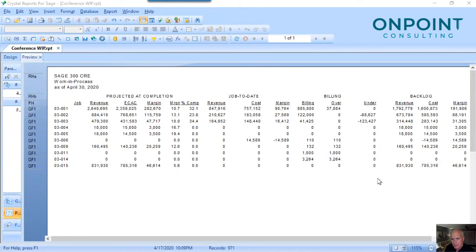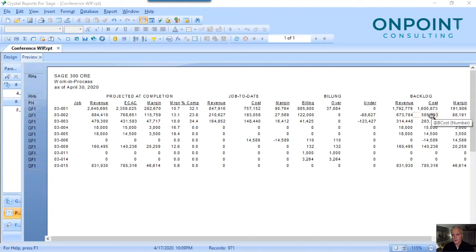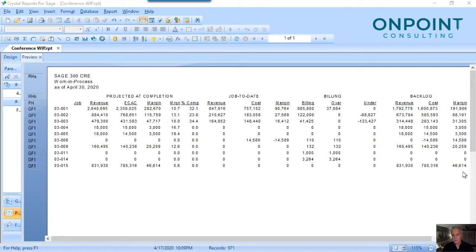Everything on the left is an after-the-fact scorecard with a certain amount of control. But the backlog is what's happening in the innings to be played. I know that my revenue has a certain backlog, my cost has a certain backlog — so I know I've got that much ahead of me in terms of resource requirements. And I've got margin backlog, so I've got that much profit margin on the books to cover my overhead. Knowing that we've got that on the books is so important right now. And if we don't, we need to know that so we can be making plans and making the hard decisions.